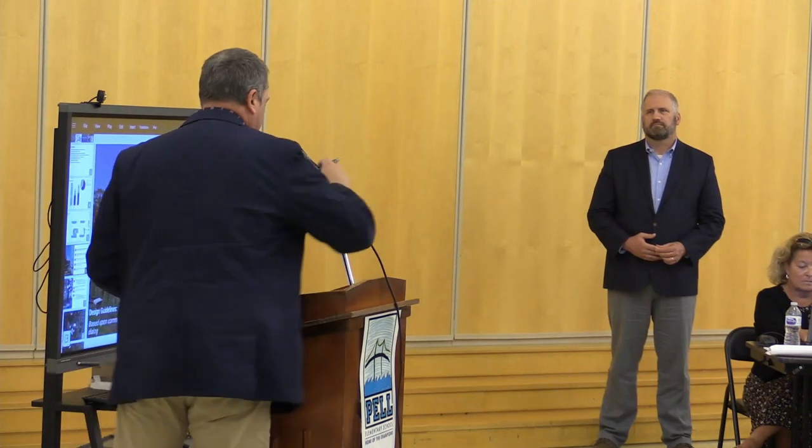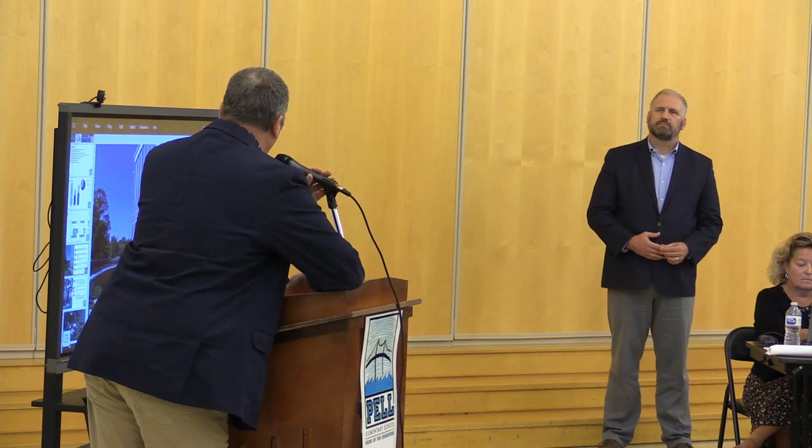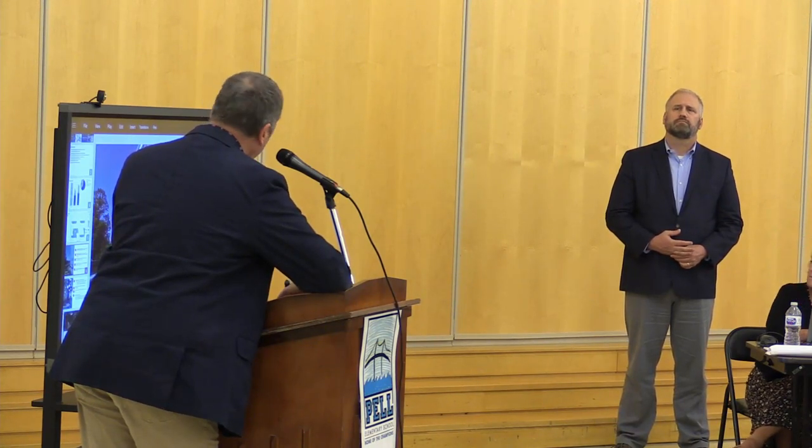So one of the things that we want to do, and I'm going to try to sidestep this guy, is look at some of these costs that we've talked about for a bit of time now, like the utility relocations from stage two. By relocating the building, we're going to see on Wednesday when we reconcile these estimates what we were able to do or not do and recover some of those funds that we thought were going to have to be spent on temporary and permanent relocation.